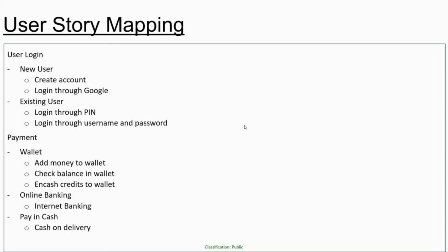This is one point. The second point can be that once the user story has been thoroughly tested, the business analyst has to validate the functionality of that user story and provide a confirmation that yes, it is working fine. It will be again required for each and every one of these user stories.